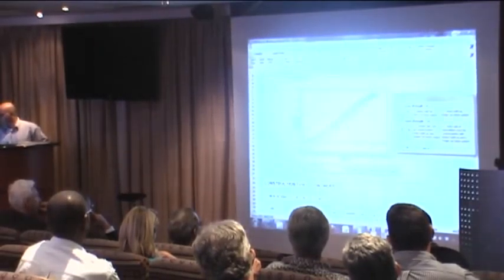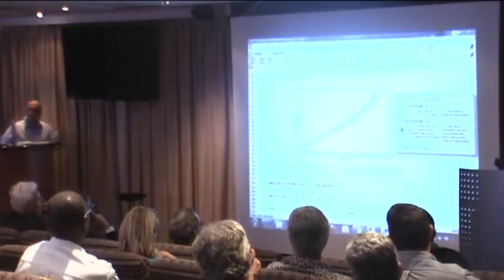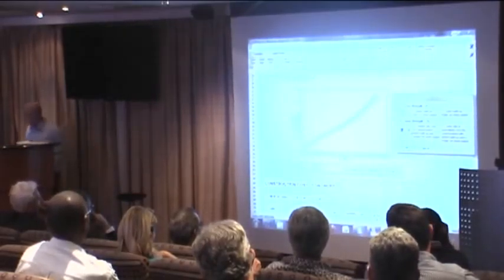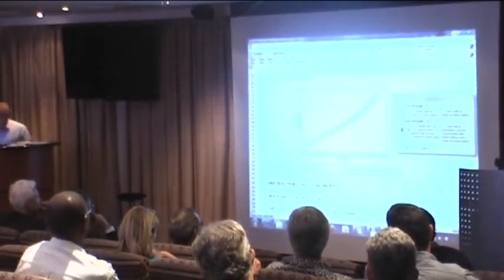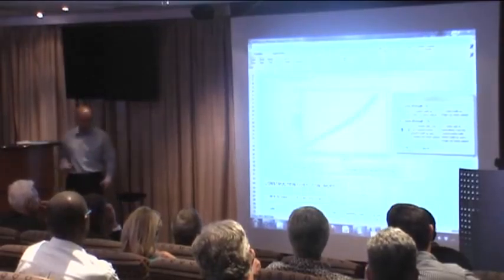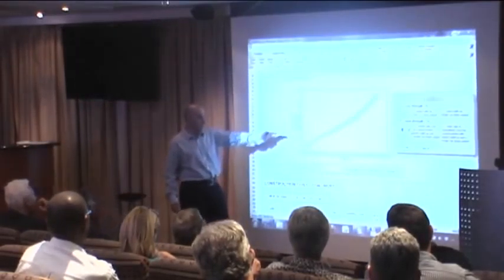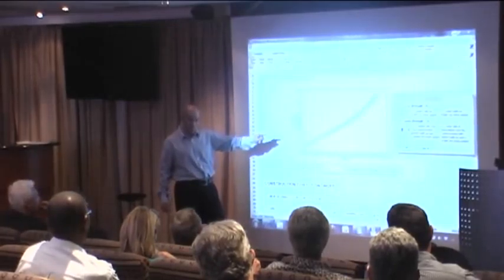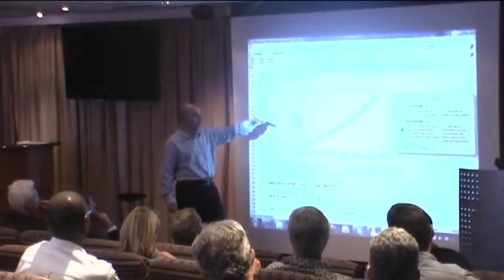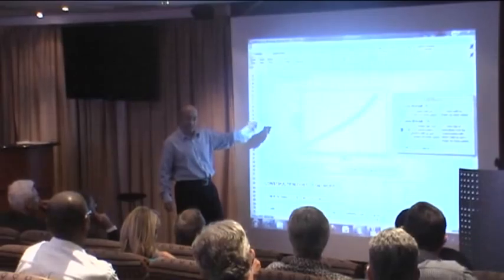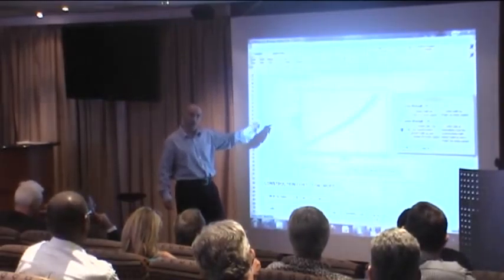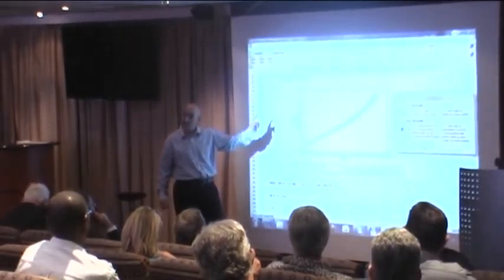Or, if I wish to go the other route, just by playing with C and K factors to adjust your project. That's quite a nice feature in terms of cash flow. One of the other features that the system allows you is not only forecasted cash flow, you'll feed in actual cash flow as and when the payments occur, and are there extensions of time, and what your expected practical completion date is going to be.